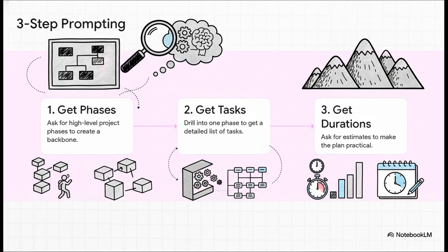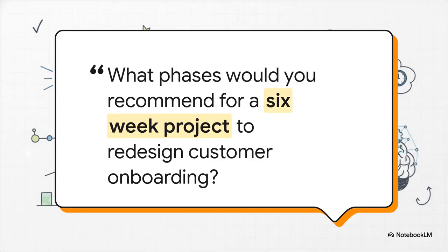It's easy to remember. First, you ask for the big picture, just the high-level phases. Then you zoom in on one of those phases and ask for the detailed tasks. And finally, you add that practical layer of how long each thing is going to take. Let's see how this actually works.